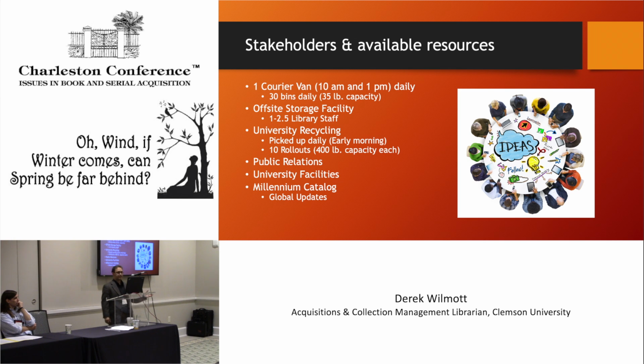I had already identified who our stakeholders were, like I said, and part of that process was working within their constraints. At 10 a.m. they would pick up, and at 1 p.m. they would pick up. So they would drop 15 bins off that were empty and pick up 15 bins that were full in the morning, and the same thing happened in the afternoon. So we were constantly moving 30 bins of materials to offsite storage.